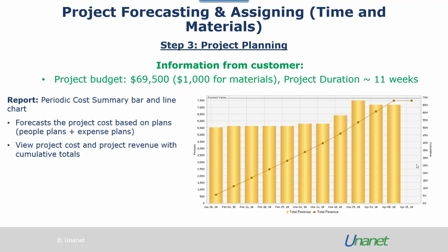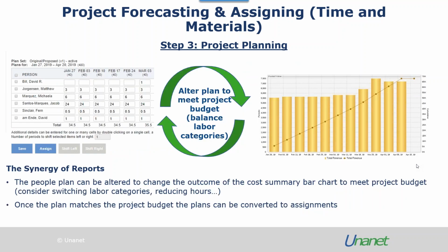On the next slide, if, however, this plan forecasted a value that was greater than the project budget, I would need to revisit my grid plan and alter it. So maybe I could switch out a person to a lower labour category of a similar skill set, or maybe some of the hours were originally overestimated and can now be reduced. So these two reports basically work in unison to get this desired outcome.